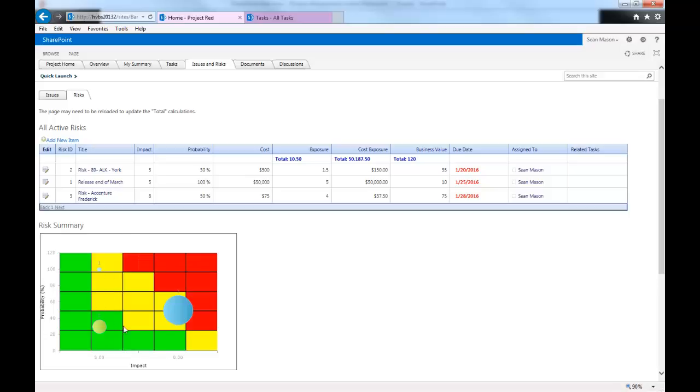And then we have a risk chart at the bottom that's going to outline each item of the project that has a risk exposure. Now, over here on the left, you have this green quadrant of blocks. And if your risks fall in these quadrants, more often than not, it's going to be a lower risk, and it's not really going to impede the future progression of the project itself. Whereas if you have a risk that falls in the red quadrants of the chart, those are going to be something you want to address with more urgency. The risks chart here basically is going to prioritize any risks that have been created within the project, and that way it allows you to address them immediately.